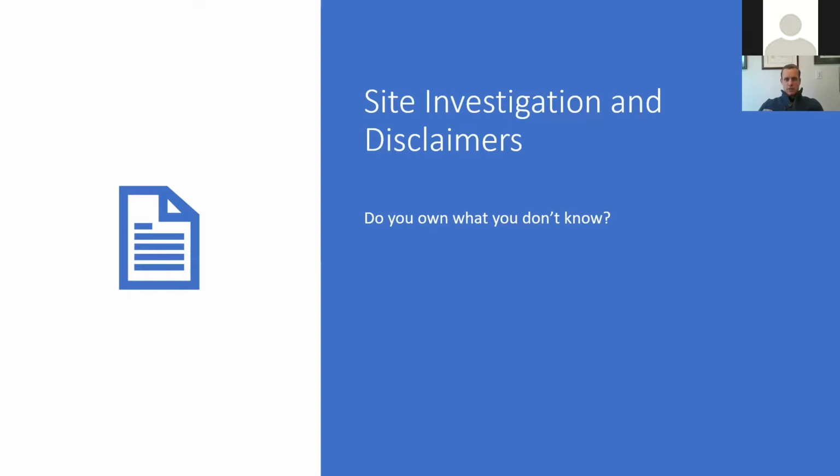Anything that says that you are investigating the site or that you're taking the site as is, where is, and any sort of disclaimer that the drawings aren't full and complete, if you're on the contractor's end or the person that's receiving that contract from an owner or a higher tier contractor, that's definitely a red flag for you. You're going to want to talk to somebody about what that means and what you might do to mitigate the severity of those clauses. Because like I said, it's a significant amount of risk that you're assuming by your contract when you sign a contract with those disclaimers.